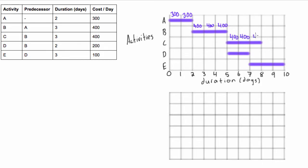So that's just for this single activity alone, but you'll notice that on day six here we're also having activity D occurring at the same time, so that's going to cost us $200 per day. So we'll write that guy in here, and it's $200 per day, so each day costs $200, and then activity E here costs $100 a day.